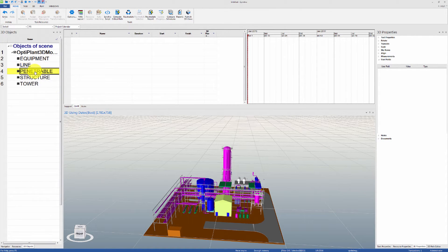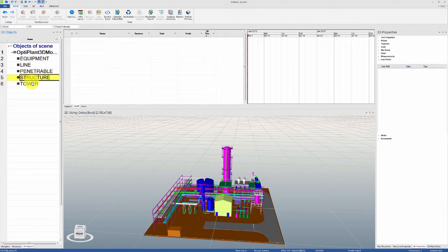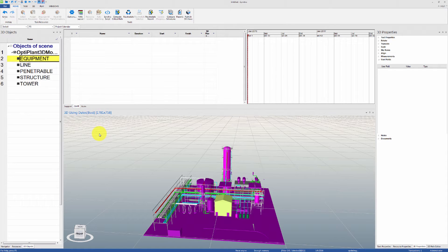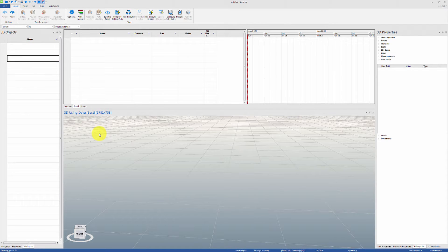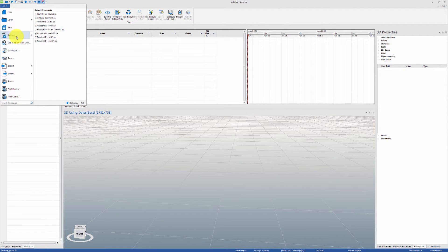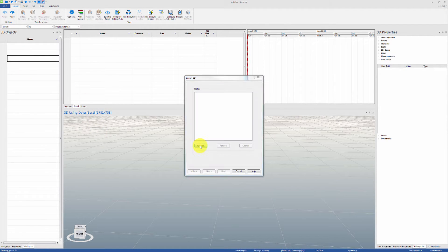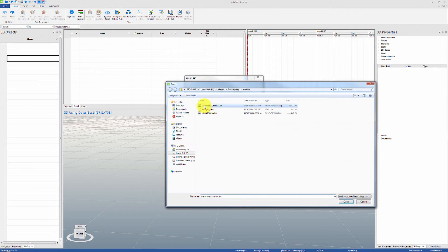However, serious 4D planning will require more detail in the 3D construction management model. Let's undo, re-import the same model, but this time set the limiting value to 3 levels.